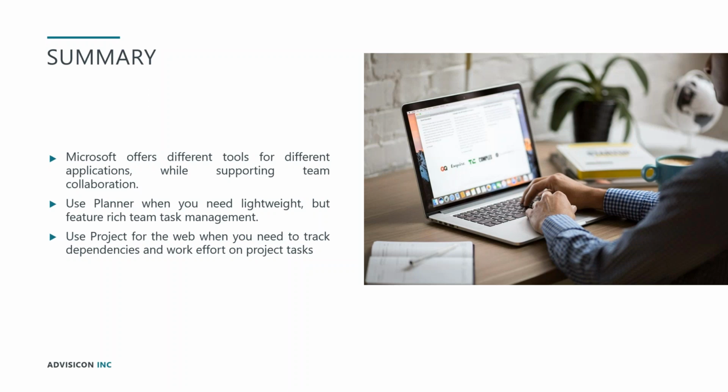But Planner is really there for when you need lightweight, inexpensive, feature-rich task management, easy collaboration, and mobile-friendly access. We recommend stepping into Project for the web as soon as you need to track dependencies, have a timeline view for your tasks, and track work effort on your projects. So at the highest level, that's where we start the conversation of whether Planner or Project for the web is right for you.